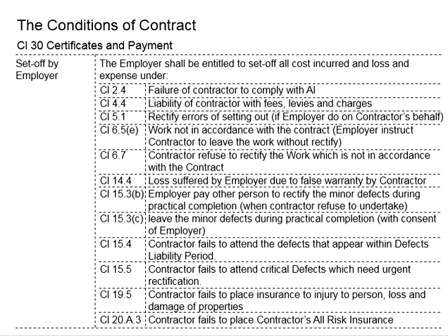Since the problem is due to the contractor, the employer is entitled to salvage the cost from the contractor, which is by doing this set off. In other words, this set off is a responsive action by the employer when the contractor does not fulfill or is reluctant to fulfill his obligations.